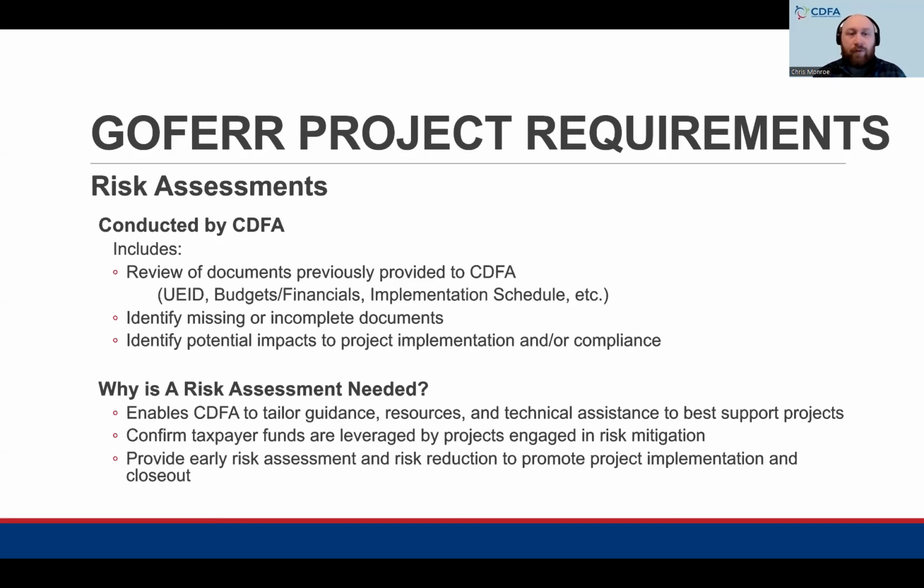We also use this process to identify missing or incomplete documents. So we're doing another review to establish if there are any outstanding components that might have been missed that we need to have on file in order to lower the risk rating of the project and identify any potential impacts to project implementation and or compliance. So as I mentioned, if we're missing a key piece of documentation that could impact project implementation or compliance, that might be flagged as a higher risk flag. So we would work with you to provide that information through what will be the monitoring process following this up.